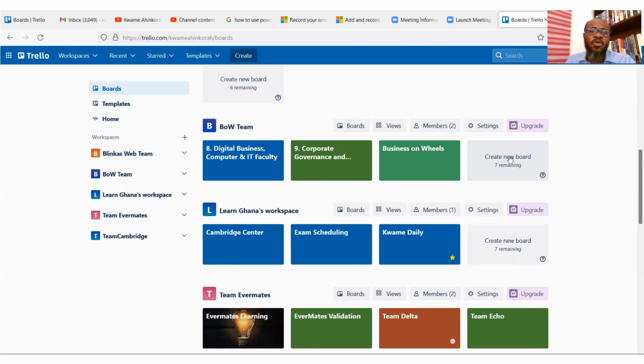In a traditional co-located environment where all the team members are in one space, typically they use wall surfaces to create their workflow. So you see to do, in, doing, and done. And then they stick the work elements on pieces of paper. Okay, and then as they complete each deliverable, they move it through the various stages.